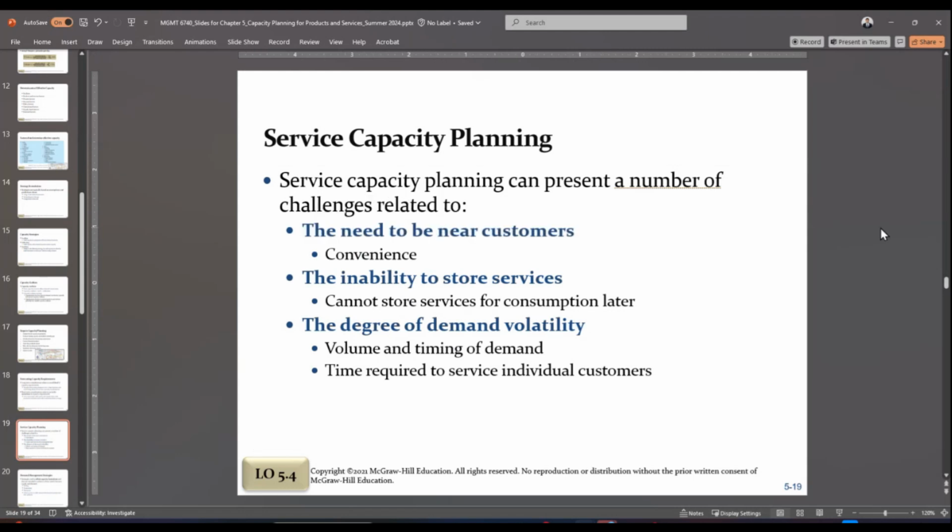So you have to check the customer availability, your crew availability, and the solar panel and whole integrated system availability, and based on that you schedule a day. It can be 1 week, 2 weeks, 3 weeks, 4 weeks, 5 weeks, but again, it has to be as per the customer convenience.